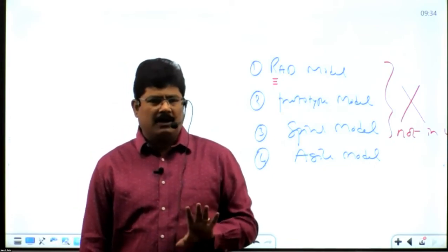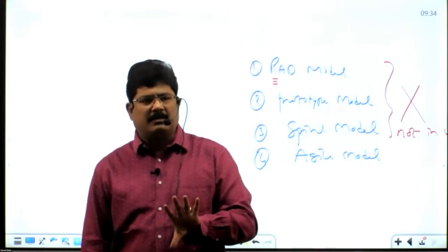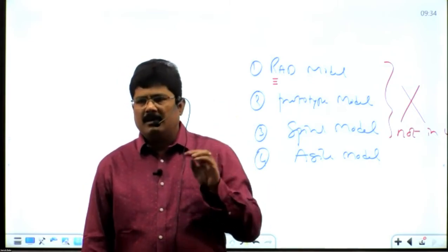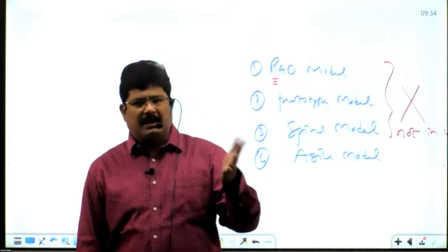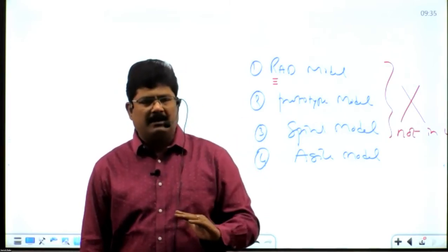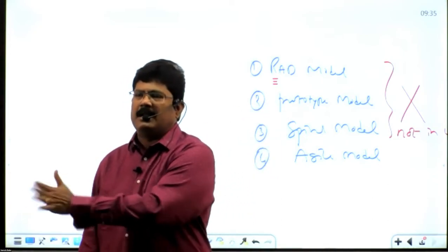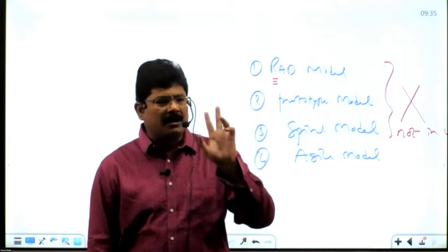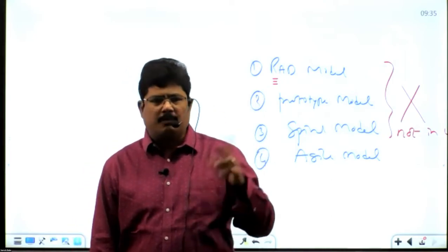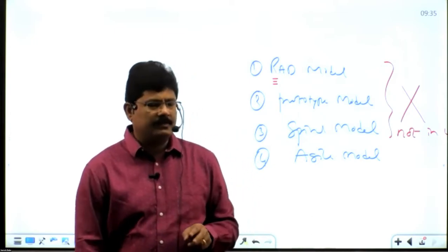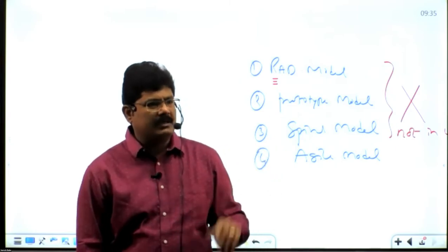Prototype-based development model. If the requirements are clear, building the prototype is also unnecessary time and unnecessary cost. But the advantage of this model is that the customer will have clarity on what they are getting, and the team has clarity: okay, this is what the customer wants, let us build it. For developing a big application where the requirements are very complex, to make the customer clear, this is what we are building for you, first make a prototype, demonstrate the prototype to the customer, get it approved. Based on the prototype, the rest of the software development activities are carried out. Such a development approach is called the prototype-based development model. Advantage, no chance of project failure because the customer already approved the simulation. Disadvantage, making a prototype also costs us time and budget.